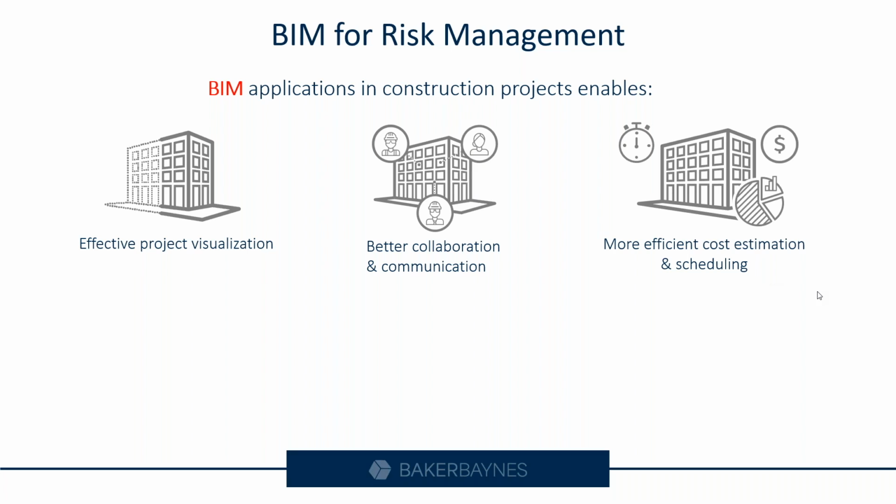And it's not something that we're very good at, right? Typically our estimations are just a thumbs up, or just the estimation from the previous project, but actually going back and tracking what the actual quantity takeoff is, and how it compares to what we've estimated, is not done quite a lot. But with the BIM-enabled process and your information-rich model, that certainly is a lot easier to do. It just requires the effort to do that, and that will inform your decisions for your next project, and your next project, and then just improving on that.